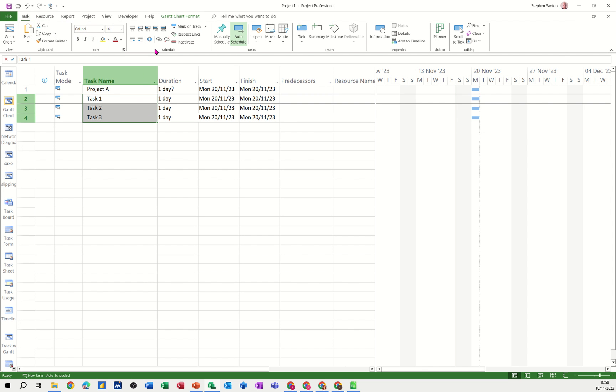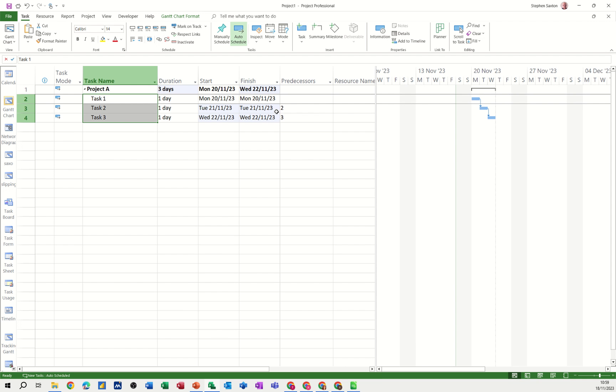Back to tasks, indent and everything's one day. Then I'll just link these up as well so they just follow on like so.